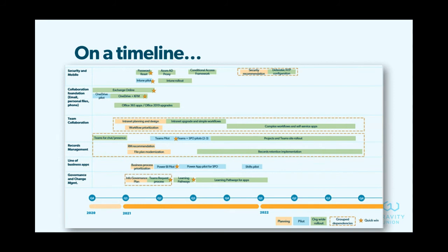You might want to group things that belong together. Maybe if there's dependencies in the details, you want at a high level to maybe surface where those dependencies are. And then highlight quick wins. So we just use stars here. Just highlight things that we believe are going to be high impact. So going back to that prioritization workshop, places where you think are going to have high impact, maybe you want to highlight that.